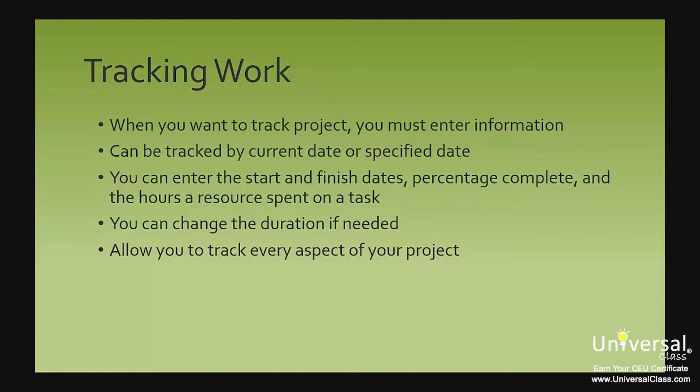What's more, you can enter materials used and fixed costs for expenses, such as outsourcing fees or shipping costs. These things allow you to track every aspect of your project, from work being done to work completed to money spent to money being spent. Project 2013 can help you track everything you need.